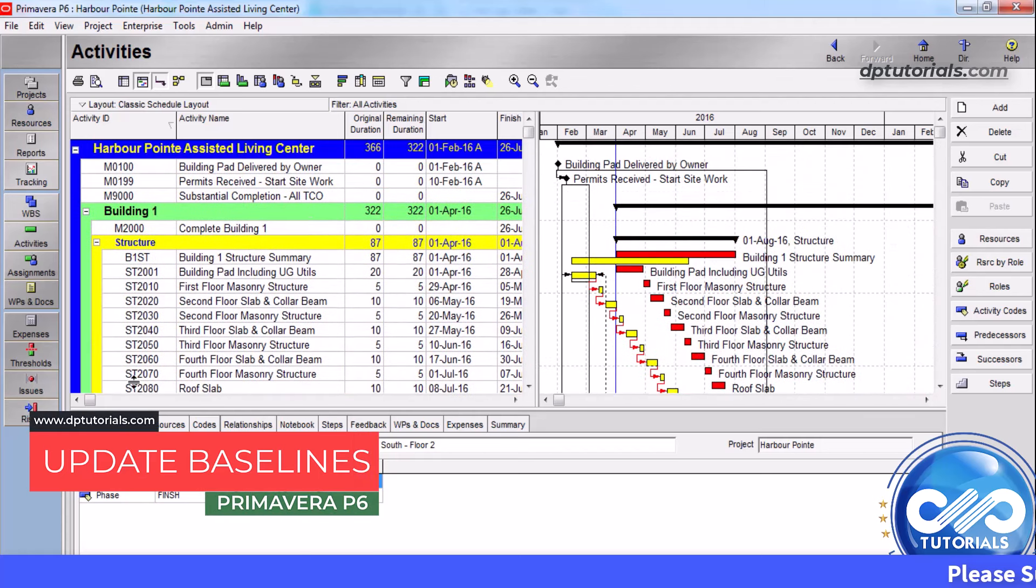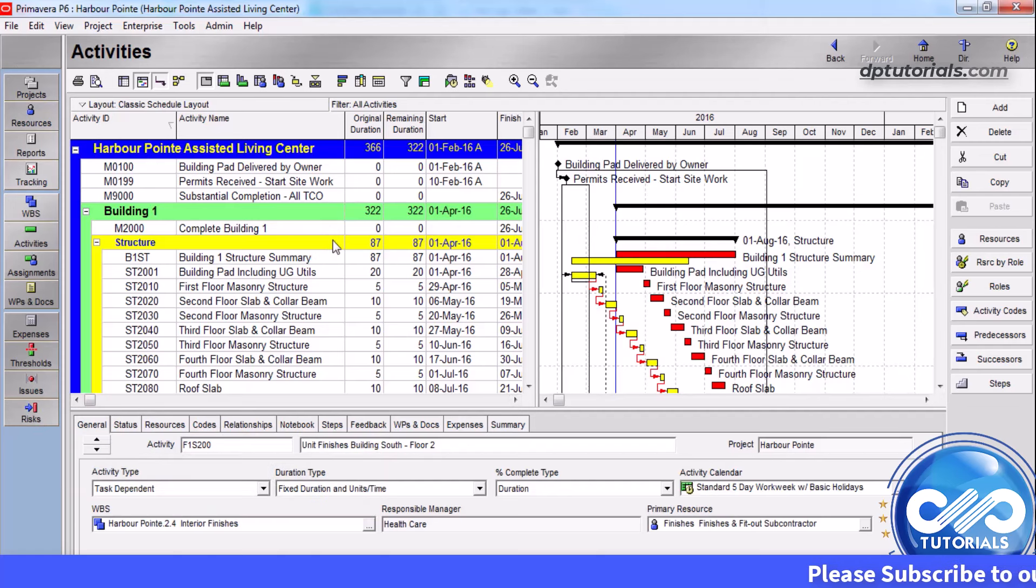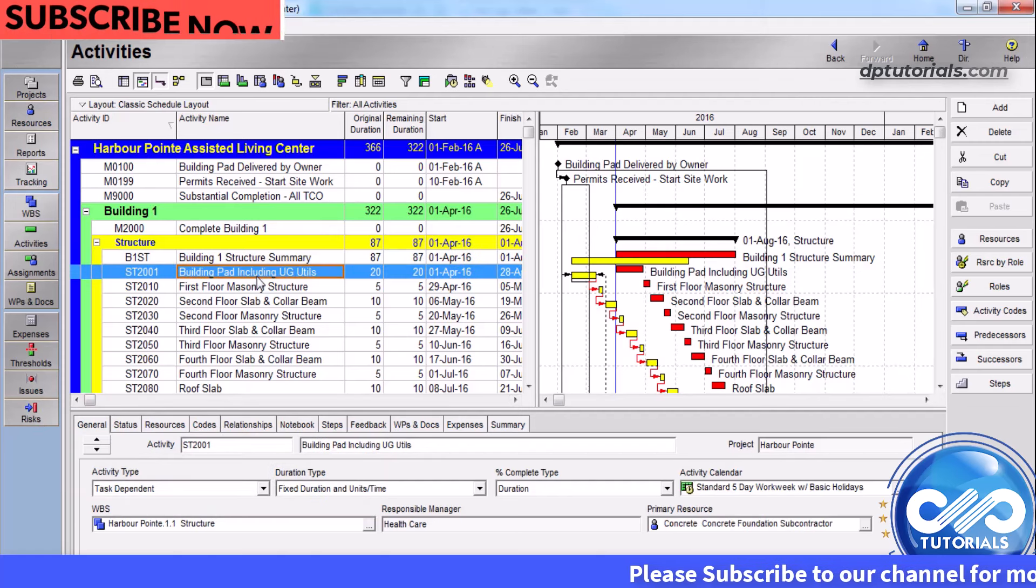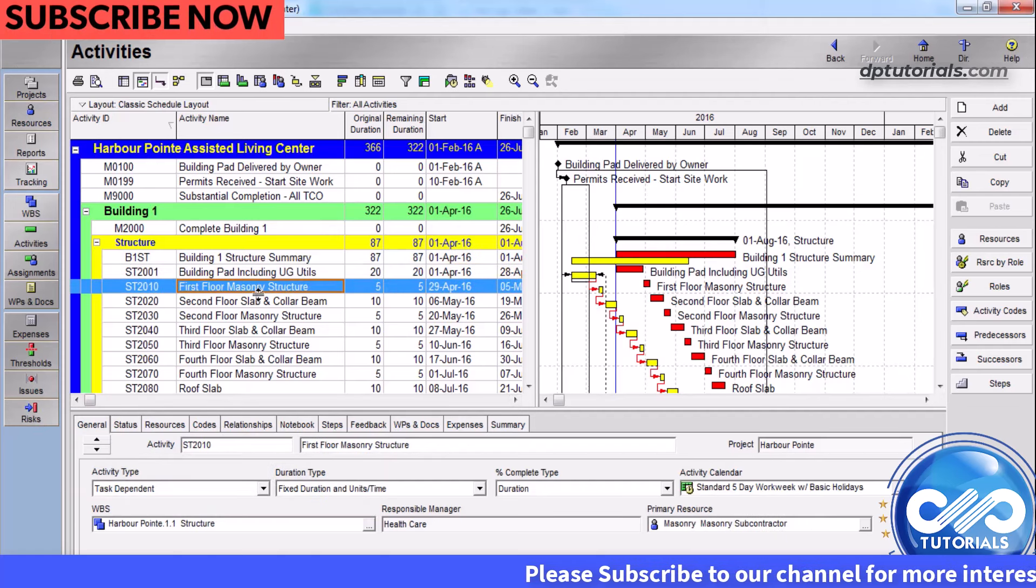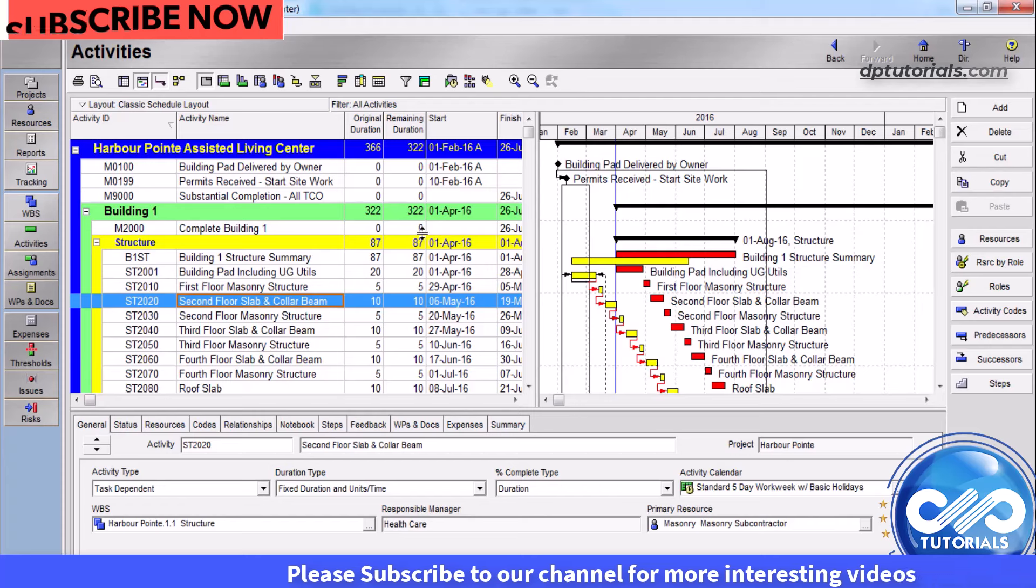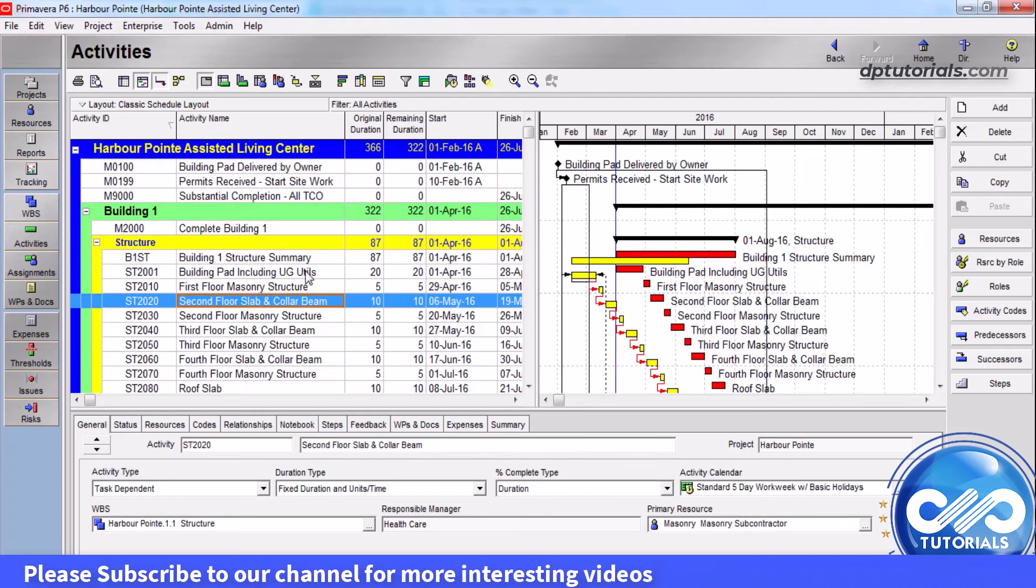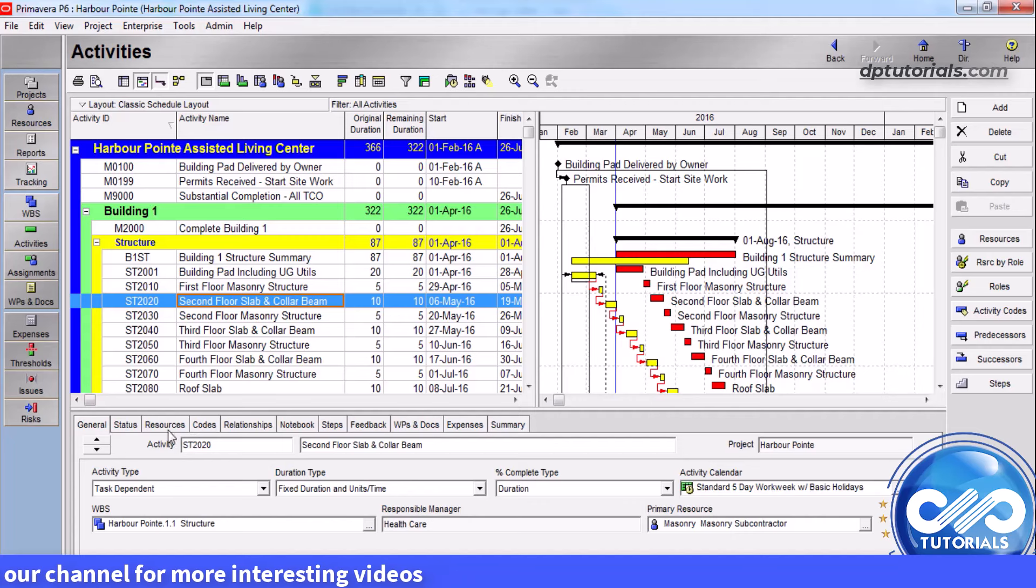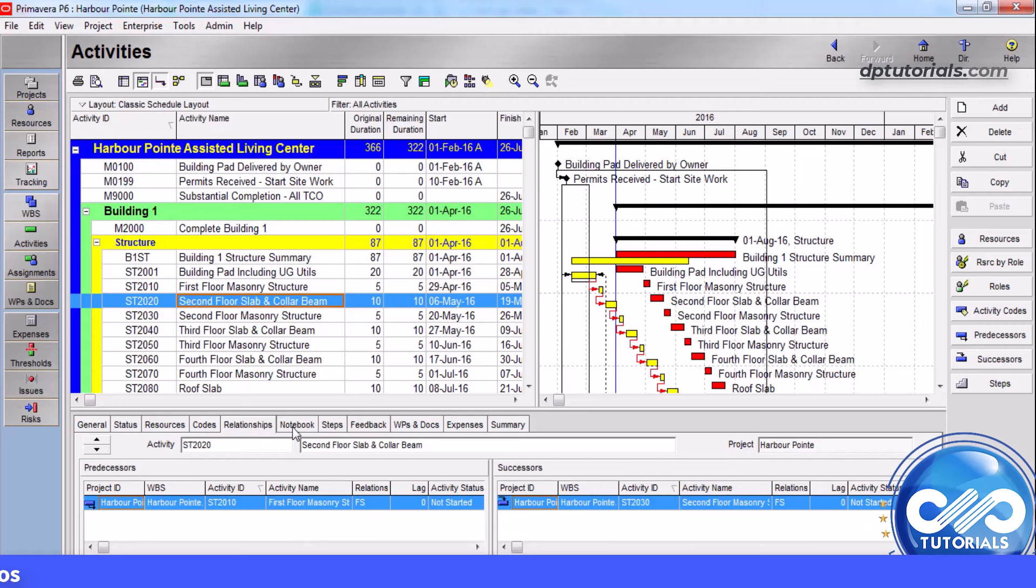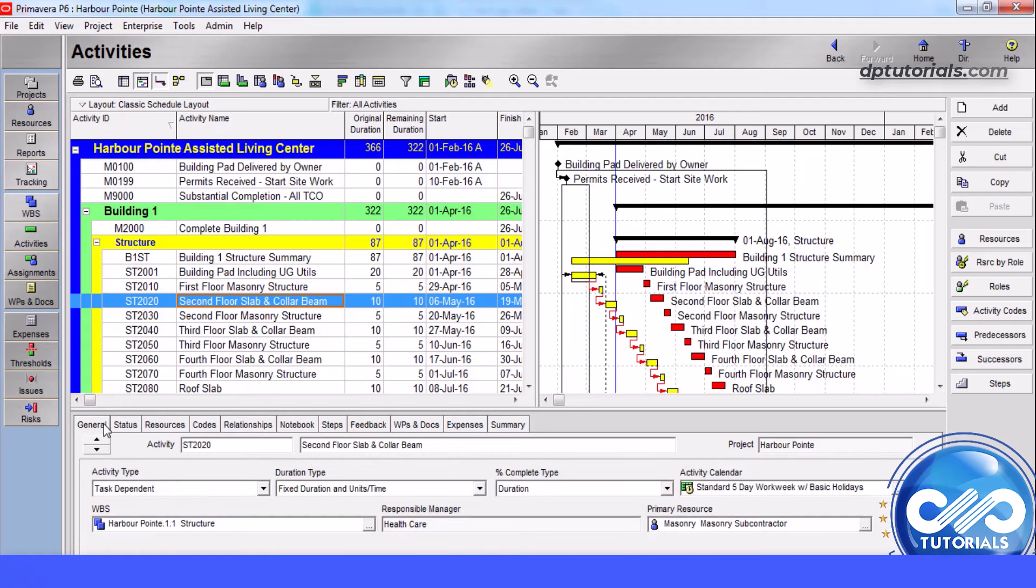As a project progresses, some of the project related data might change. For example, there could be deletion or addition of activities. Modified data can include dates, costs, resources, steps, relationships, documents, codes, expenses, and other user-defined fields. There may be project-level data like risks, issues, and thresholds also.